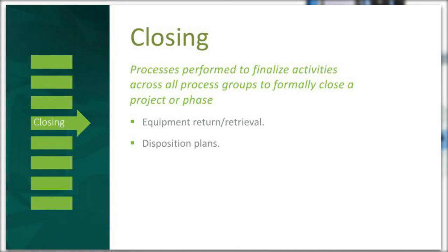And now, when should you plan for this disposition? Of course, like we said before, proactive is better than reactive. And we have found that it's usually best to plan for the disposition at the beginning of the study. This will ease any process and not delay any possible favorable outcomes.